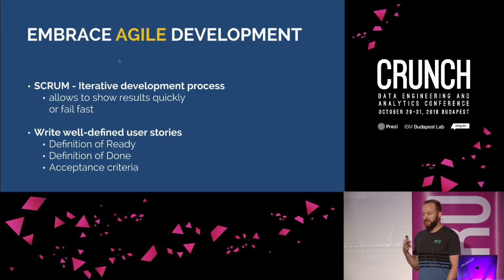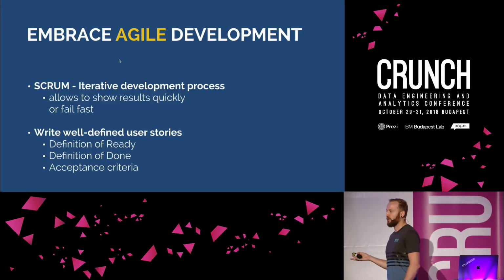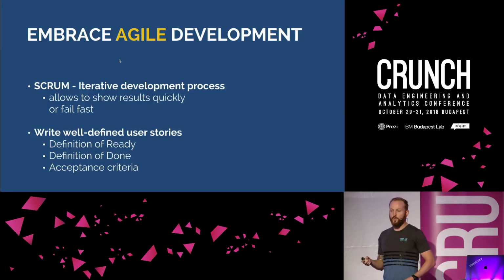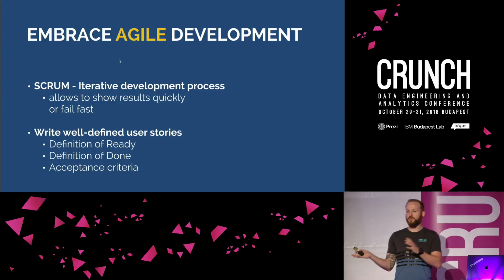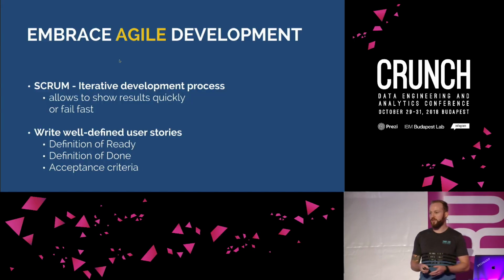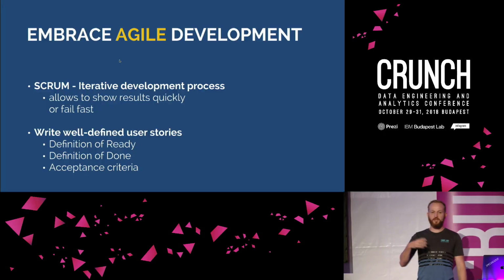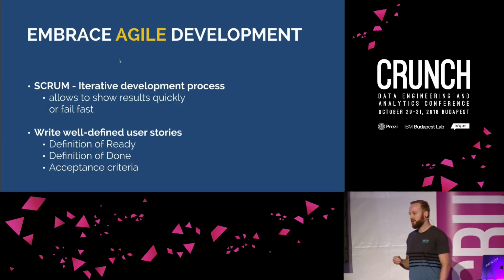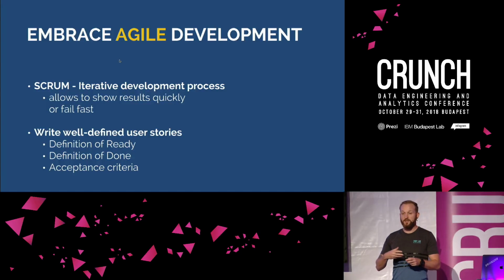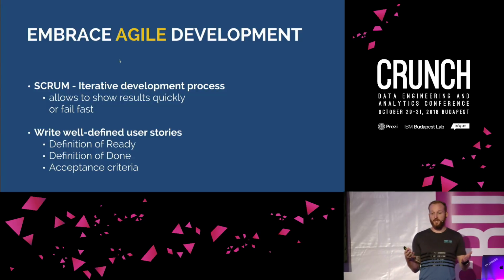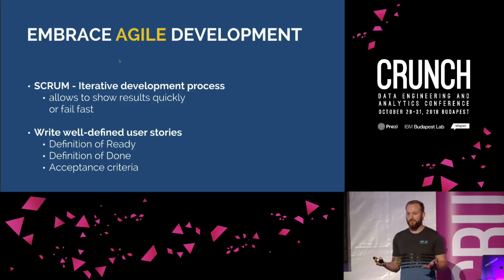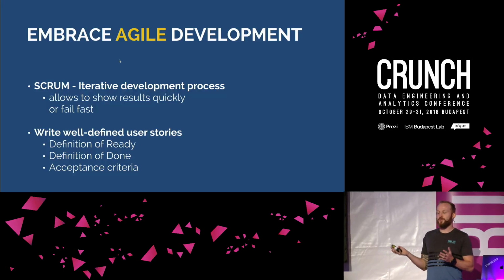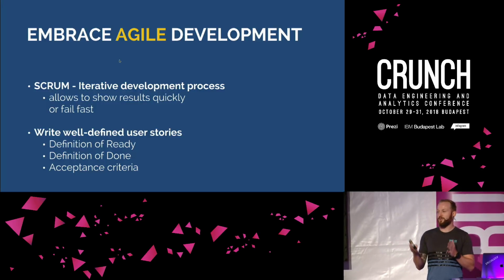What we did at first is that whenever a request from a user came in, we just wrote this request down one-to-one into a Jira ticket, and in the next sprint, some of the data scientists or data engineers would deal with that. But it turned out that this had a lot of insecurities and unclarity involved, because stakeholders do not describe what they want in much detail.